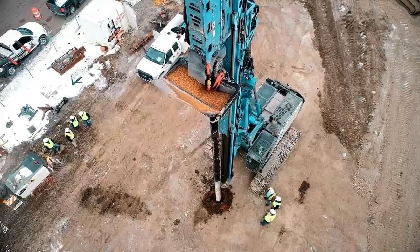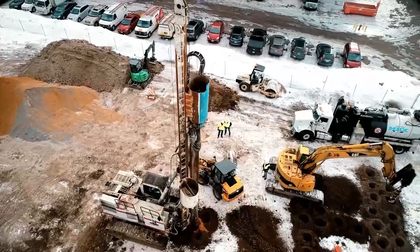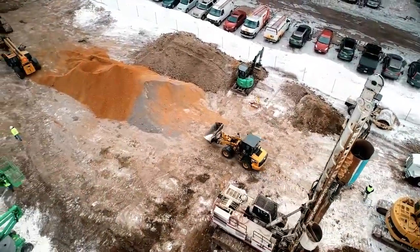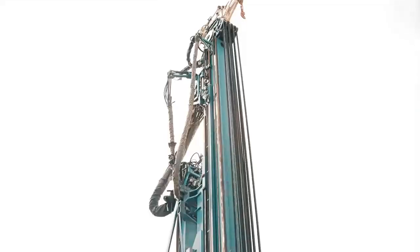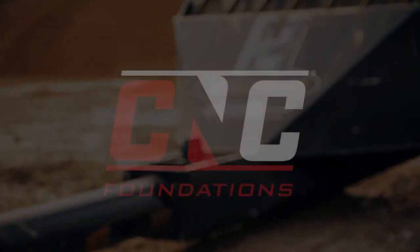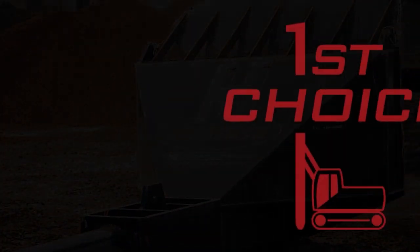By doing slab support, we minimize the over-excavation and replacement below the slab. We are also installing slab support vibratory stone columns through the existing fill. This will ultimately cut time off the overall project, saving our customer money and resources.